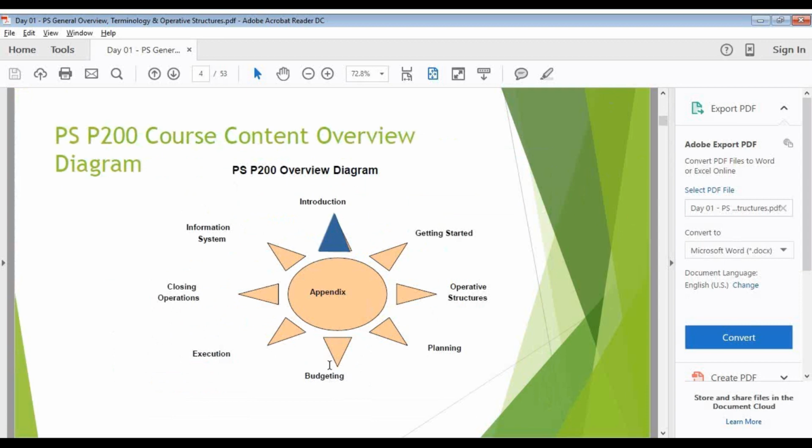Activities are only cost-incurring objects. Activities will never take care of the revenues, and even budgets cannot be assigned to the activities. Budgets and revenues can only be assigned to, and revenues can only be generated from, the WBS. WBS is the work breakdown structure.